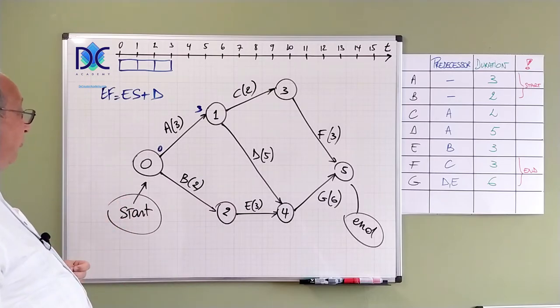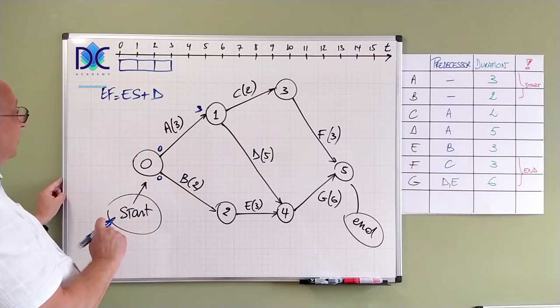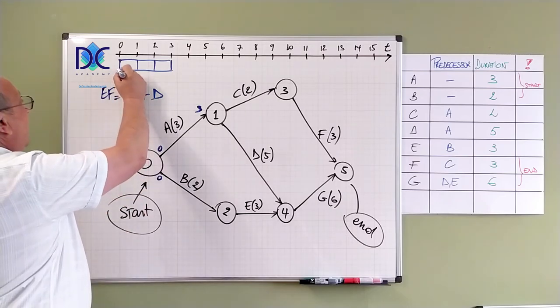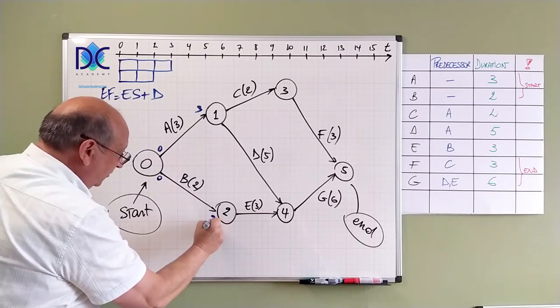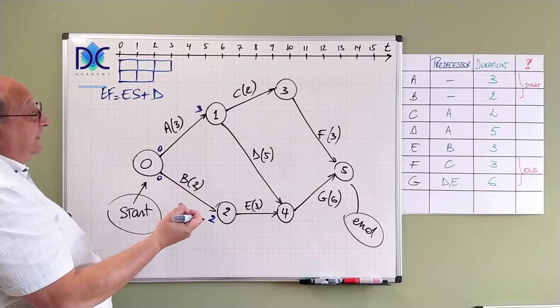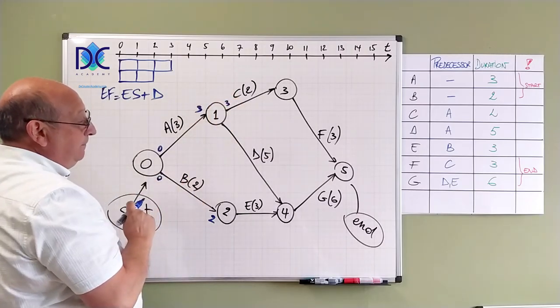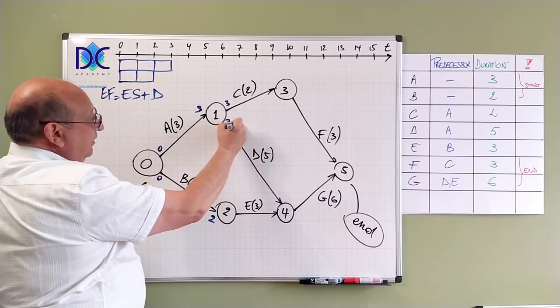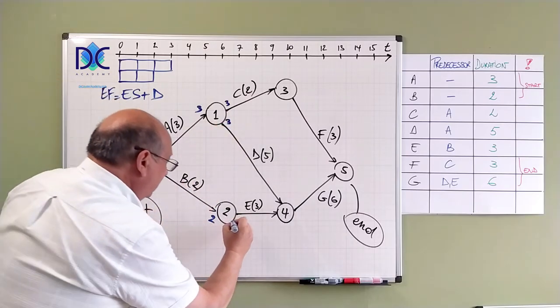It's a quite easy formula. For B we have the same. B starts at moment zero. And ends at moment two. At time two. A period of two. Now what's next? C will start after A. D will start after A. And E will start after B.